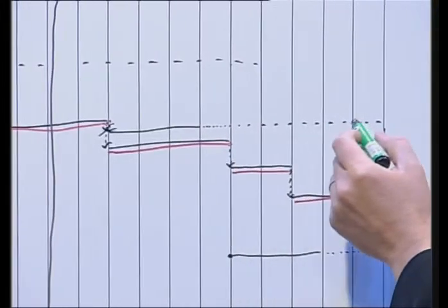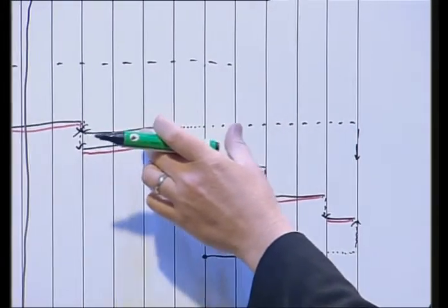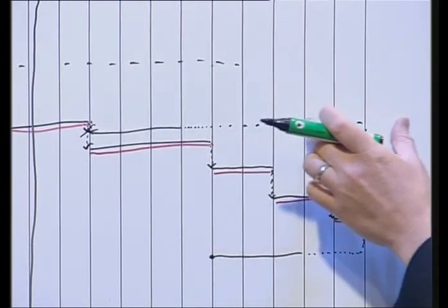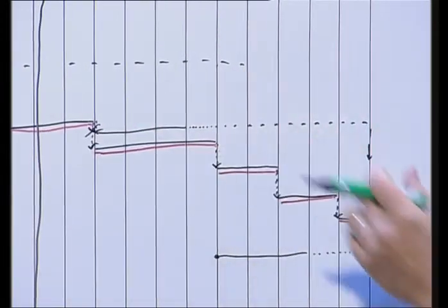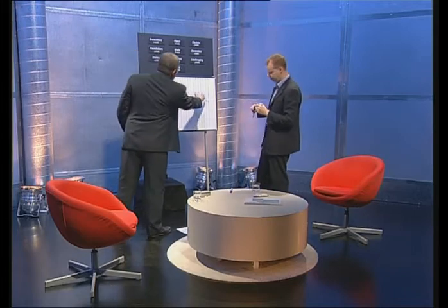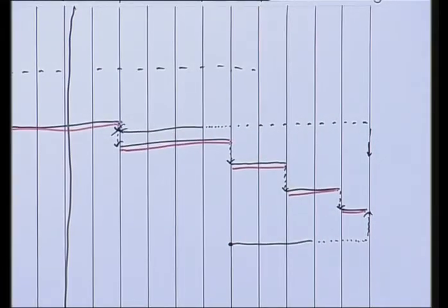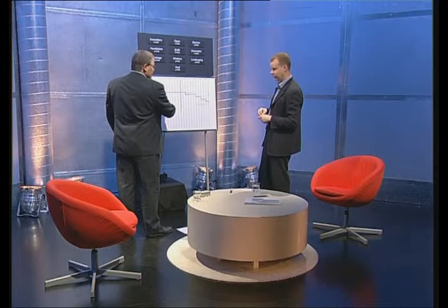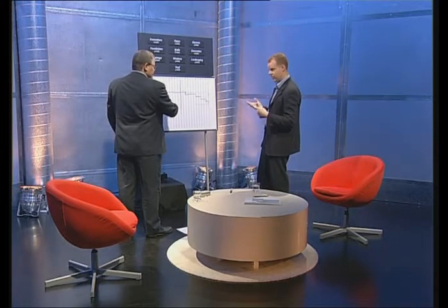And in this case, as you can see, I could actually reduce some of the float and turn this into a much later activity. Yeah, so you've got 6 weeks float there, so if you only discovered that the window's going to be on such a high delivery, you've got 6 weeks to play with the program. Exactly, which is a reasonable time for me to procure windows.